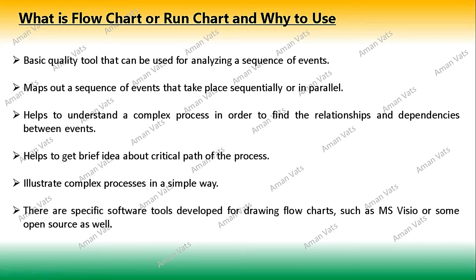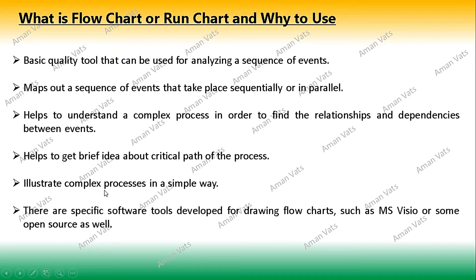Pictorial representation really helps you understand how your process is flowing in a particular sequence of events. It maps out a sequence of events that take place sequentially or in parallel. It helps to understand a complete process in order to find the relationship and dependency between events. You can't do this in your mind — once you chalk it out on paper you immediately see the relationships and dependencies. It also helps get a brief idea about the critical path of the process, and illustrates complex processes in a simple, easy-to-understand way.